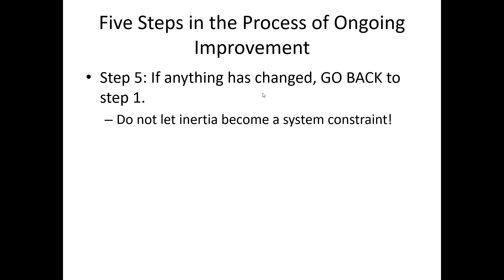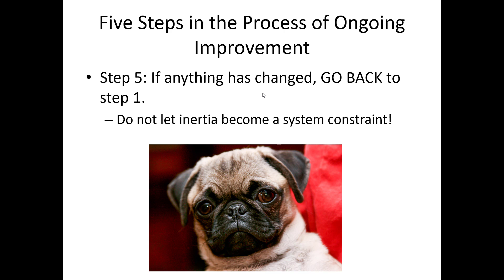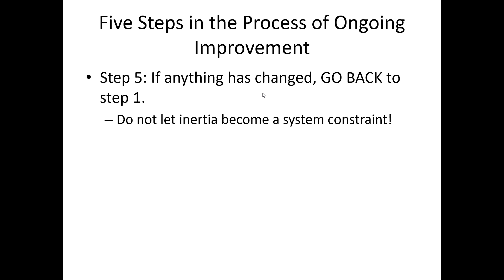Lastly, step five: if anything has changed, go back to step one again. It's a process of continual evaluation. There's nothing that says just because you fixed a constraint and made it better, that constraint doesn't shift to something else — just like another critical path can appear in project management. We could improve one process enough that it's no longer the constraint; something else becomes it. So we identify the new constraint, exploit it, subordinate other activities to it, elevate it, then go back to step five and re-evaluate. It's never-ending — a process of continual improvement. Those are the basic steps in the Theory of Constraints.